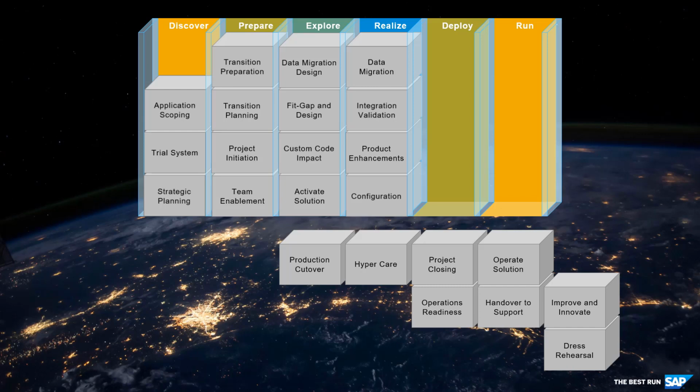The test cycles enable the migration team to improve data quality to an acceptable production level, develop a detailed cutover sequencing plan, and exercise data reconciliation and validation processes which are required to support the production cutover.